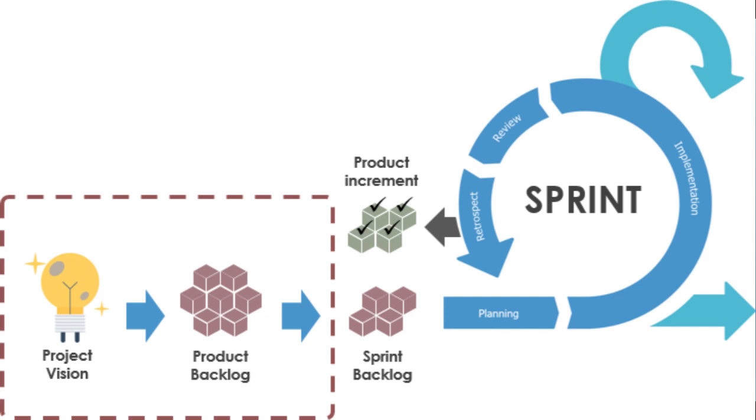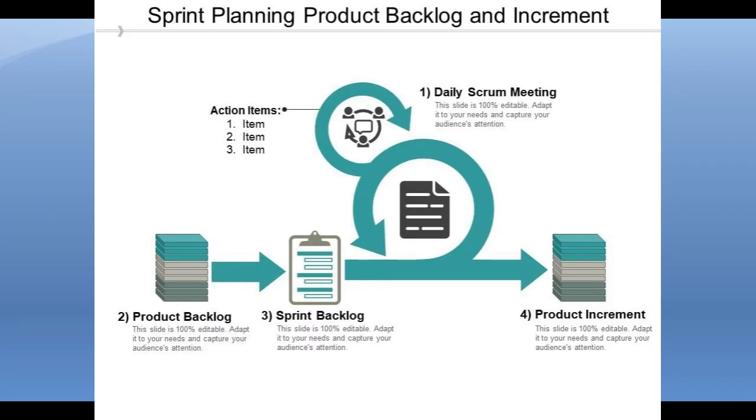First thing is unrealistic sprint planning. We know friend, whenever we are starting a project in the scrum framework, we have to conduct the sprint planning meeting. Sprint planning meeting is basically a meeting in which the scrum master, product owner, and scrum development team are sitting together and they decide what are the things which will be a part of the release for that sprint. Actually, the team may take on more work than they can realistically complete within the defined time frame, and the team may find it challenging to meet the committed goals, leading to incomplete work, quality issues, or increased stress or pressure on the team members.